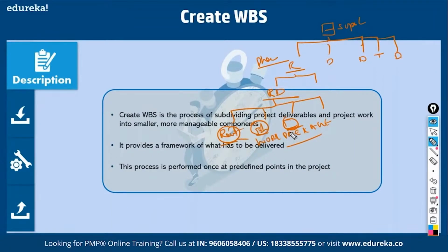Now you call the guys and tell them, guys, start working. They'll start working in a very feverish way. Oh, my requirement documentation is Reuters, is it? Okay, I know. You address this to John. John will say, well, these are all the processes I must do. Number one, I have to do a bit of research. Number two, I have to collect requirements. Number three, I have to document requirements. Number four, I have to get a sign off. So like this, you split a work package into activities and plan how to deliver it.